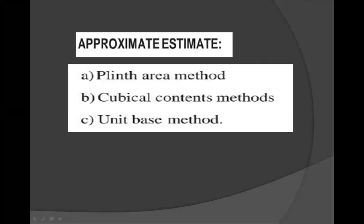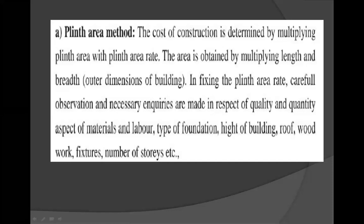Approximate Estimation has three stages. The first one is the Plinth Area Method, the second is the Cubical Content Method, and the third is the Unit-Based Method. The cost of construction is determined by multiplying the plinth area with the plinth area rate. The area is obtained by multiplying length and breadth — it is the outer side dimensions. In fixing the plinth area rate, careful observations and necessary enquiries are made regarding quality and quantity aspects of materials and labor, the type of foundation, height of building, roofs, woodworks, finishes, and number of storeys.